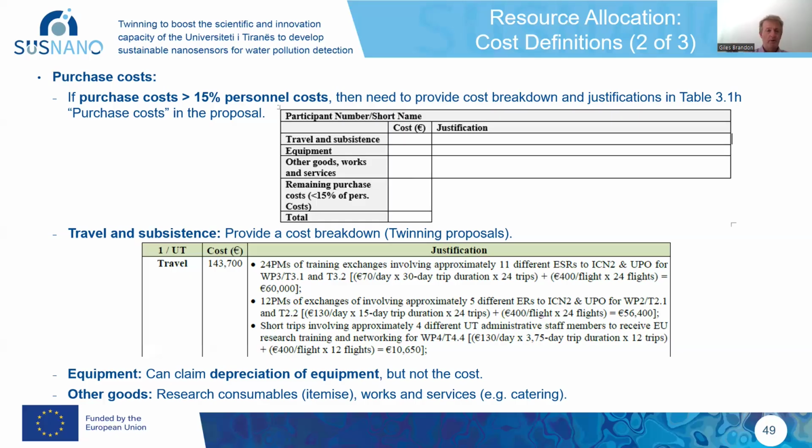If you're doing a research and innovation action or innovation action, where the travel costs have a much smaller percentage representation of the overall cost, you don't need to go to this level of detail. It's probably enough just to say, look, here's so much budget for typically so many researchers to go to so many consortium meetings per year, to go to so many conferences per year. Yeah, that would probably be enough. Okay, enough about travel and subsistence.